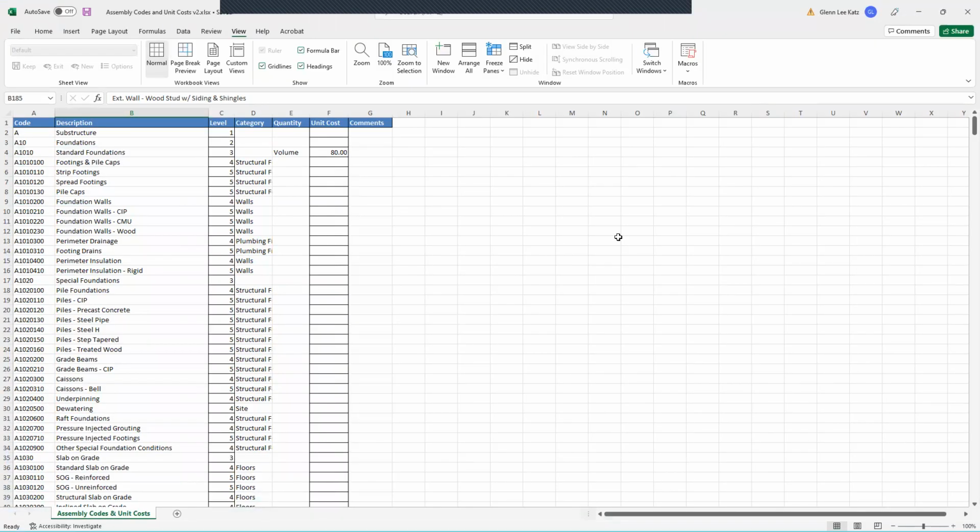Once it's here, load it into Assemble so you can match against it. And then from Assemble, export it and load it into Revit so you have perfectly aligned codes. If you do that, from there on out, Assemble will be pretty kind to you in terms of tabulating those things and making updates very quickly as your designers keep on giving you different versions of the model that you have to generate quick estimates for.